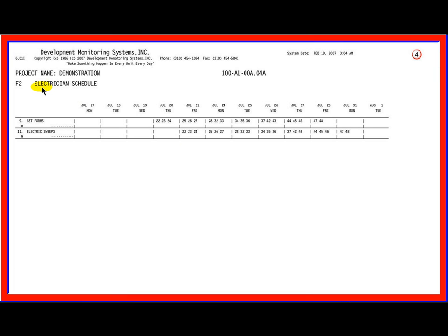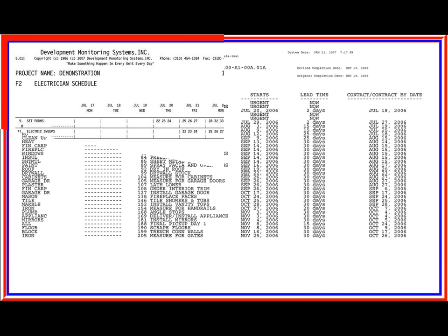While the master schedule is a current snapshot for all affected subcontractors, the system also provides each individual subcontractor with his own schedule. This report gives 2 weeks advance notice of upcoming work. Both of these reports can be emailed and provided at a server site. Proof of receipt and notification of a schedule change is then accomplished. This is not only useful in job meetings, but makes them necessary and meaningful. This is real job planning with everything agreed to in print for commitment.